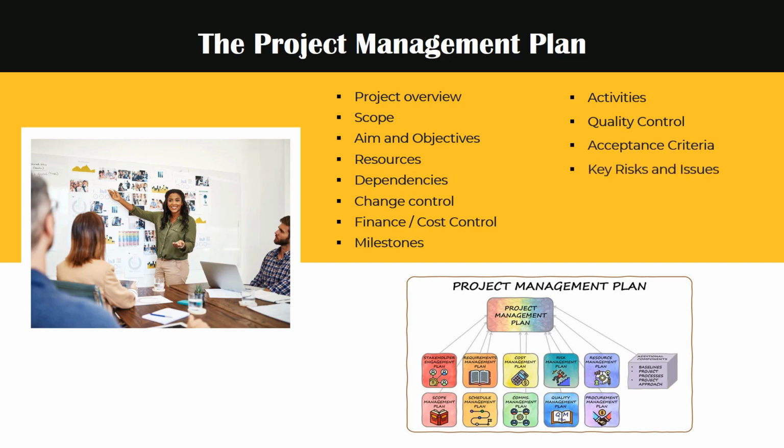Risks and issues. You will capture all of the key risks and issues to the project in the project management plan, as well as documenting the process undertaken to manage risks and manage issues. A risk is the potential of a situation or event to impact on the achievement of specific objectives. An issue is a problem that is now breaching or is about to breach. Issues will typically require support from the project sponsor to agree a resolution.